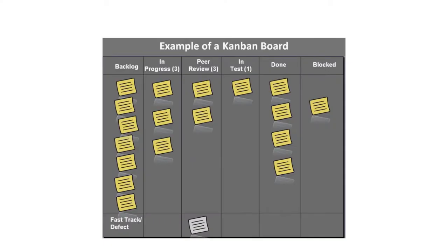One of the things to start managing your work, using a pull model, is Kanban. Kanban is a pull model where instead of you pushing the work, it's the resources who are available, and based on their availability, they start pulling the work. That's how the Kanban process typically works, right? And that also gives you a visual idea of your work in progress. That's very important. Work in progress leads to piling up of inventory. You don't want to pile up the inventory, and Kanban also puts a control on that work in progress.